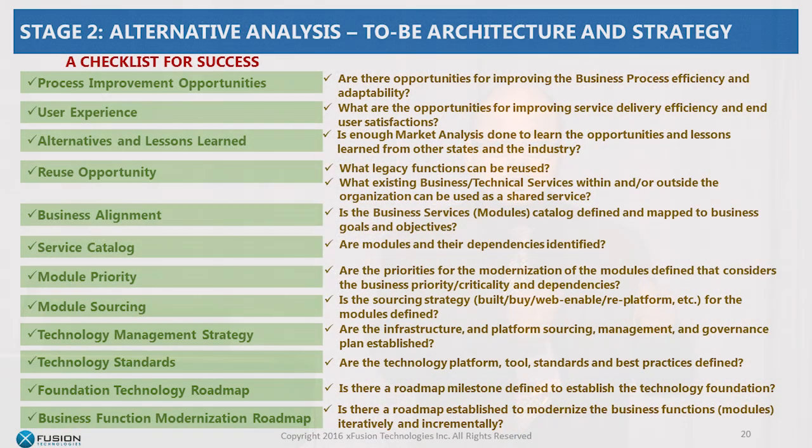Technology standards. Again, we talked about many cooks, many recipes. Every vendor will come with their tools and technology, or you might invite a vendor who will build something that becomes your technology standard. That's a biased decision. That vendor will build based on what they know or what tools they prefer to use. So the foundation for the technology standards and the infrastructure standards needs to be defined very precisely. On top of that, I can be very prescriptive in my procurement, asking the vendor to build this for me this way, not what you think is right for you.